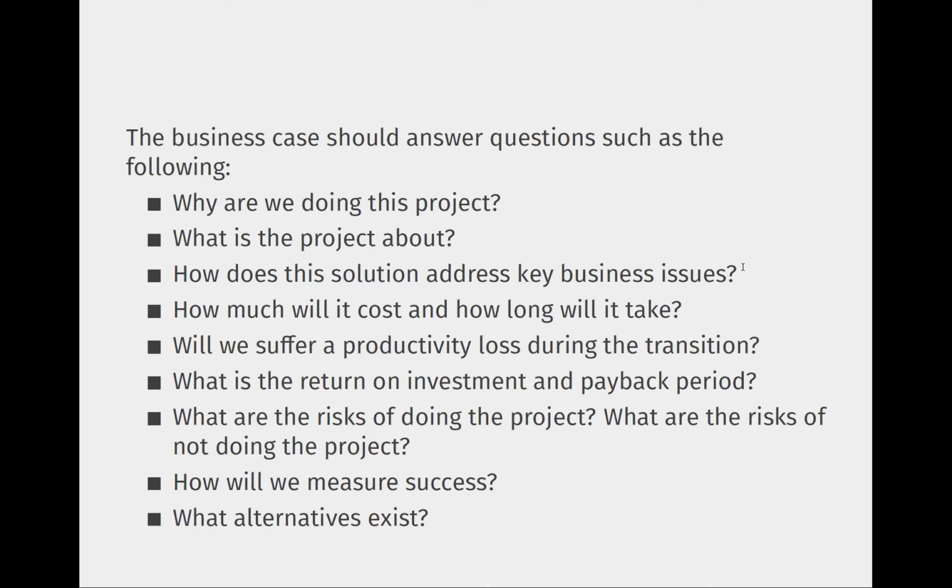There are other questions, like: will we suffer productivity loss during the transition? When you're implementing a new information system, sometimes it might take time for users to adapt to the system. There are many issues that might evolve, so whether there is any productivity loss, you need to measure early. What is the return on investment and payback period? I will explain these terms later with an example. Return on investment means how much you invest and how much you are getting back. And payback means how long it will take to get back what you spent.